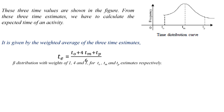In this beta distribution, the weights are 1 for T0, 4 for Tm, and 1 for Tp — giving more weightage to the most likely time estimate. So the expected time for the activity is Te = (T0 + 4Tm + Tp) / 6.